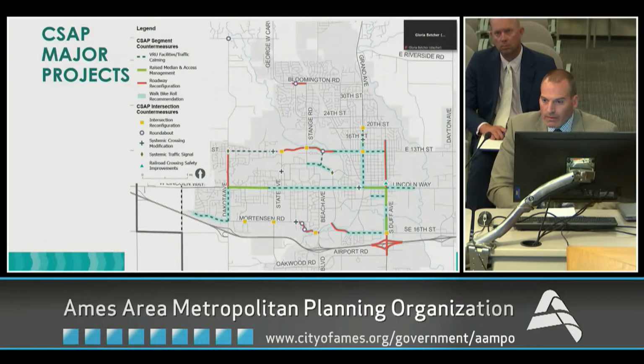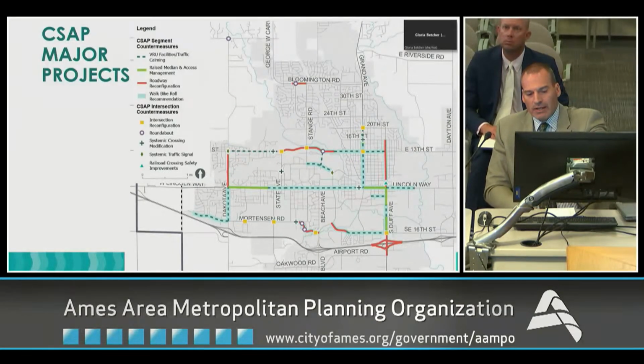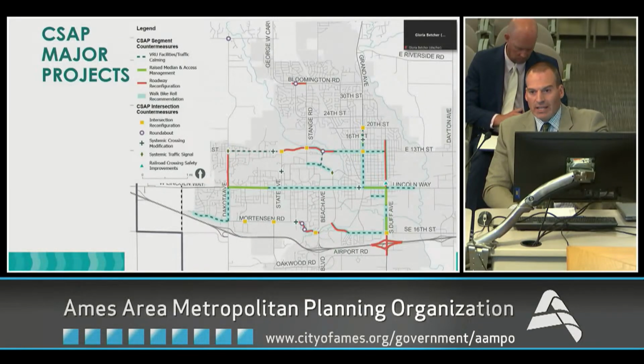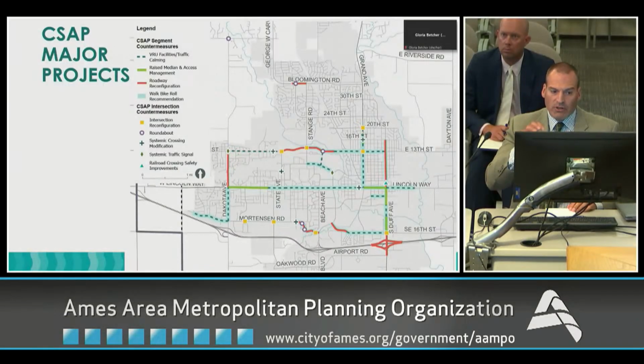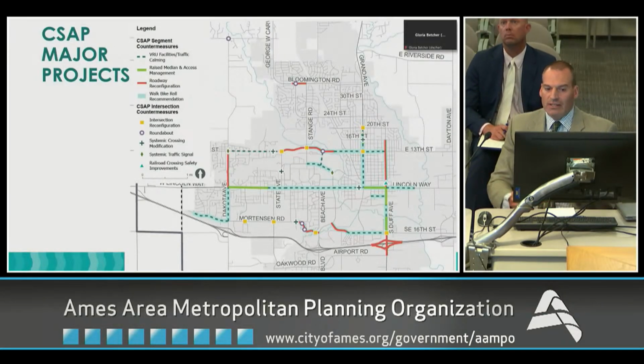Great, thank you. This has been very helpful. And maybe one thing I would add about this map that we were talking about, and I think is important to point out, is that this plan doesn't do engineering. So you might see projects with categorical names like an intersection improvement or a roundabout improvement. That is because the attributes of the road and the characterizations of the problems at that location put it in a category where the best thing you should do is go look at intersection reconfiguration. But that means start the design process, start a public meeting process, figure out and root out all the issues. This plan doesn't get to that level. It's looking at those high level metrics.